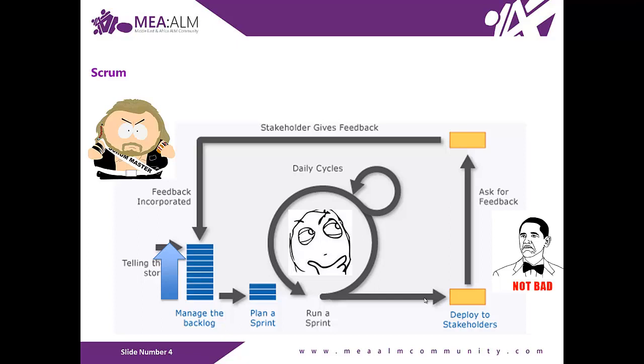And then you have that long cycle, which is your sprint duration. During that duration, the dev team will do their daily activities, whether it's design, implementation, testing, and the Scrum stand-up meeting, which happens usually first thing in the morning, and it's a time-boxed 15-minute meeting, where everybody in the team needs to answer 3 questions: what I did yesterday, what I'm doing today, and if I have any impediments or obstacles or issues that are preventing me from completing my task.